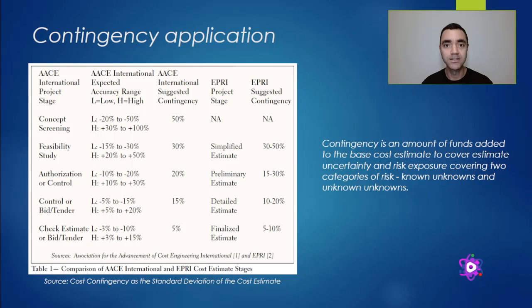Your project is still in development, in verification, and eventually you will be able to start it in 6 or more months. So because of that, you will add a contingency for the equipment in order to try to mitigate the risks of having your project authorized not now but in 6 months, for instance.